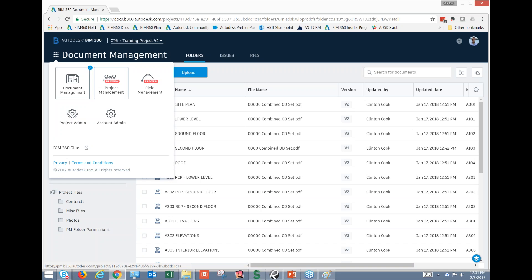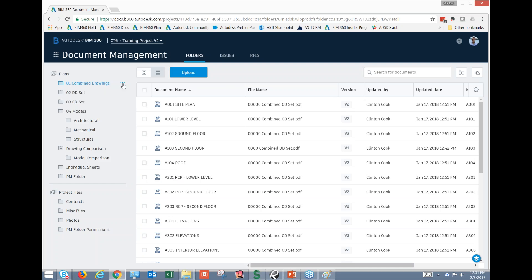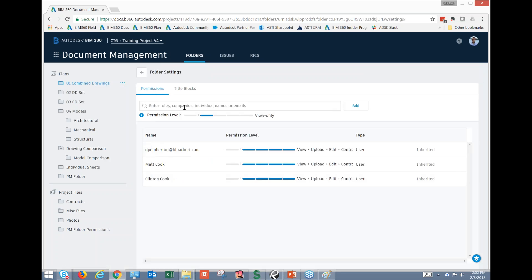Document management is by far the one that's been out the longest and is really starting to be solidified in its functionality. The system is set up to give you a really robust level of functionality with regards to permissions. We can permission each individual folder by role — a project manager can have access, or we can do it by company or by individual email — with options for View Only, View/Upload, View/Upload/Edit, and View/Upload/Edit/Control.